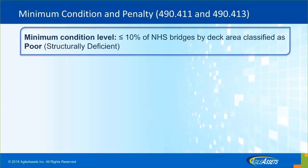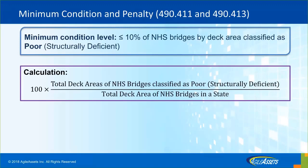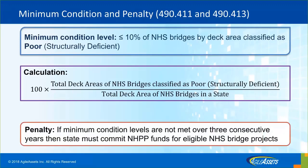Regardless of what target a state sets, there is a minimum condition level that states cannot exceed — and that is 10% of NHS bridges in poor condition. The calculation method is based on deck area: the total deck area of bridges classified as poor divided by the total deck area of all NHS bridges. That percentage should not exceed 10%. If a state cannot meet that requirement, they need to set aside a portion of National Highway Performance Program funds for only eligible bridges or projects — basically, states lose some flexibility in spending funding.